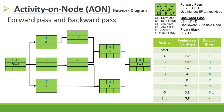For the forward pass, we start with early start = 0, so Start: 0 + 0 = 0. Activity A starts at 0, 0 + 1 = 1. B starts at 0, 0 + 3 = 3. C starts at 0, 0 + 5 = 5. Activity D starts at 1, 1 + 6 = 7. Activity E starts at 3, 3 + 7 = 10.